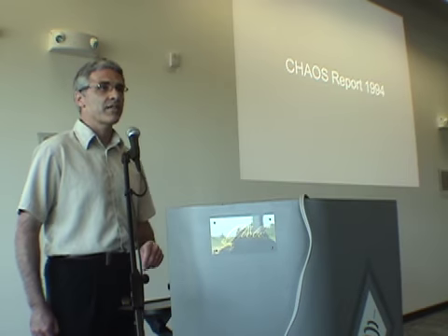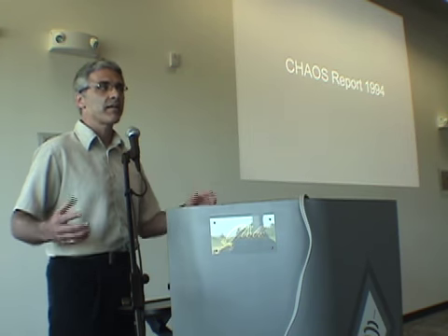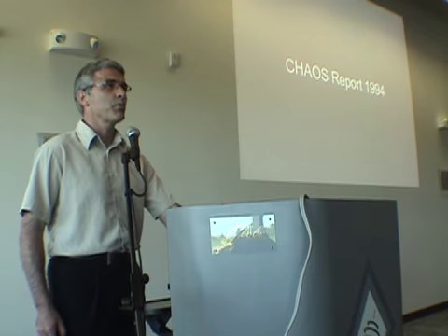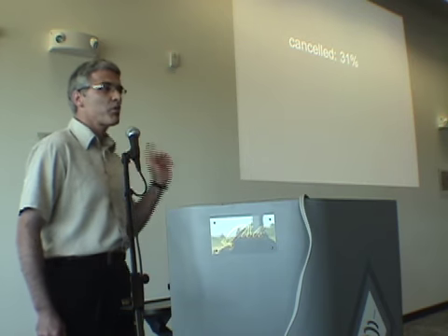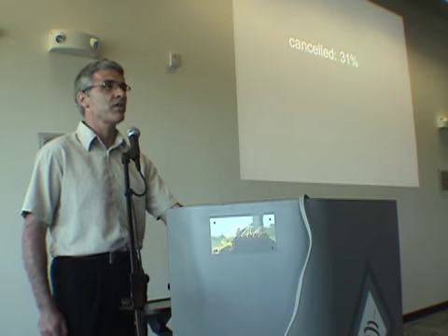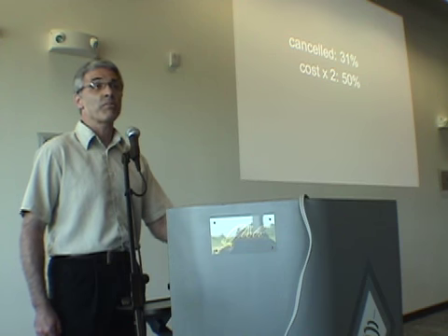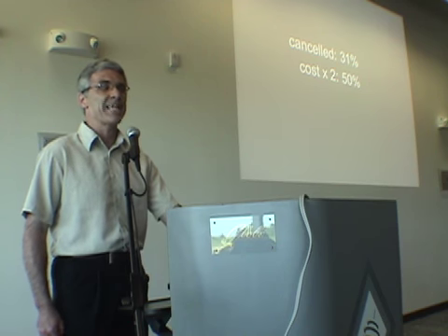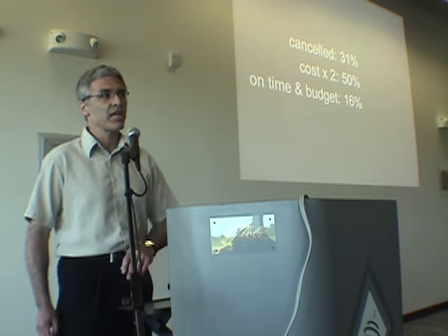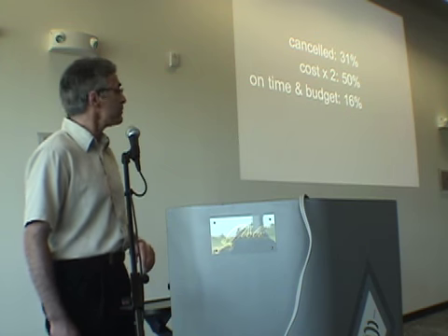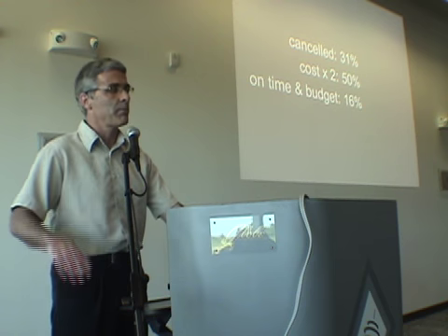And actually it's been under a crisis for at least since 1994. It was first brought into, say, the public perception by the chaos reports, which had some amazing statistics on canceled projects. About a third of the projects were canceled within 1 year of starting. Projects that went over budget, 50%, or more than up to twice as much as they were initially budgeted for. And 16% of projects actually completed on time and on budget. Pretty dismal numbers. And they're not much better now, by the way. We are better, but not much.